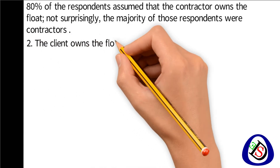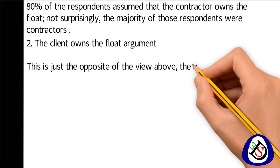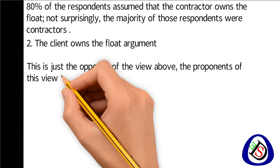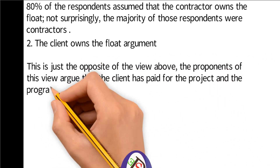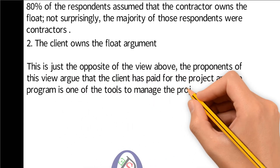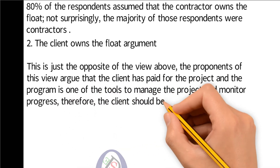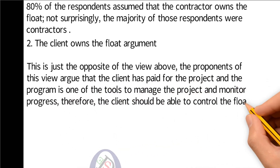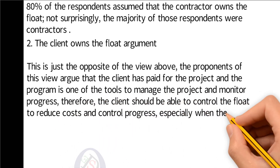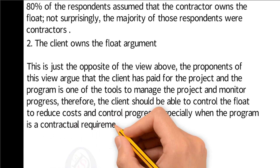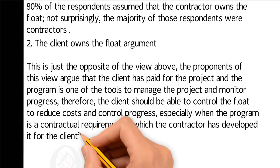Two — the client owns the float: this is the opposite view. Proponents argue that the client has paid for the project and the program is one of the tools to manage the project and monitor progress; therefore, the client should be able to control the float to reduce cost and control progress, especially when the program is a contractual requirement in which the contractor has developed it for the client's benefit.